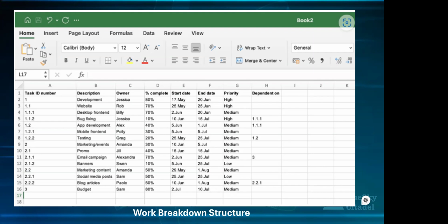Imagine if on this work breakdown structure they've had the login first before having registration. Where you have "dependent on", that one being done will be dependent on the ID that you have for the registration. And with a work breakdown structure, once you put it down, you're able to reprioritize things, move things. Definitely the login is dependent on the registration. Let's assume they've put the login in maybe sprint one, using the work breakdown structure now as an example for Agile, but definitely we know we don't use it for that. Registration needs to happen before that.